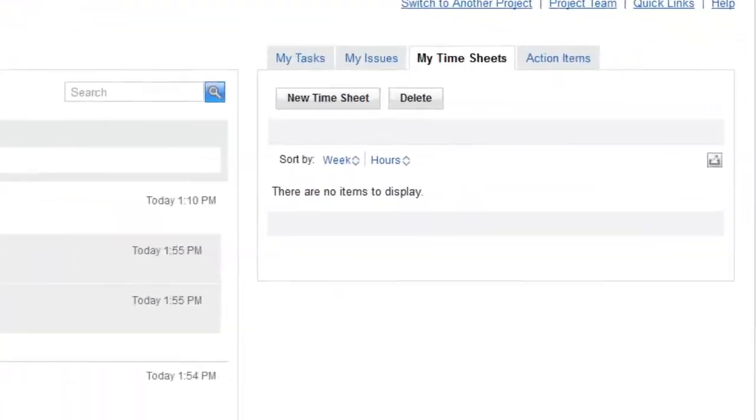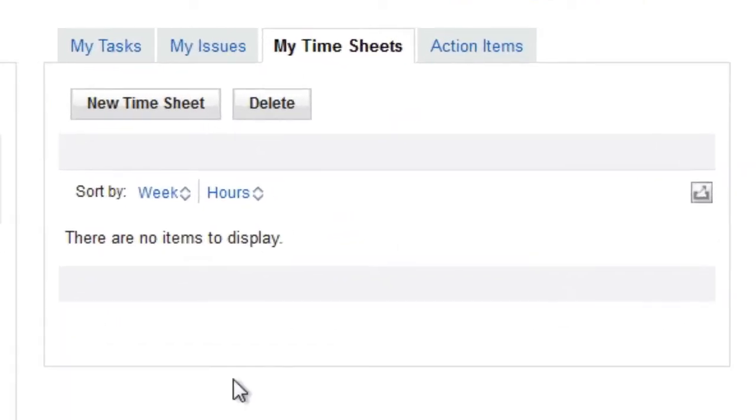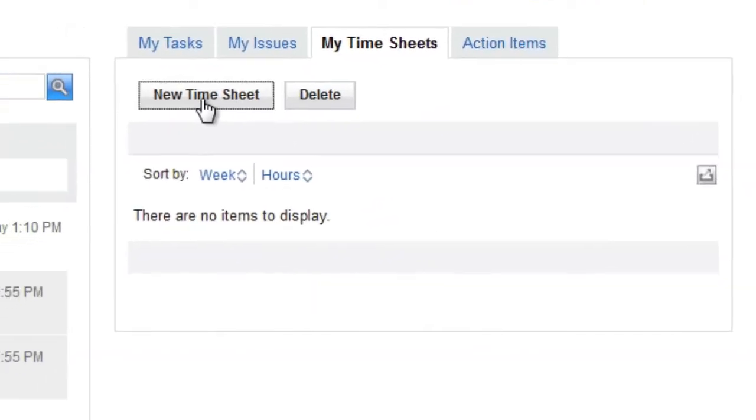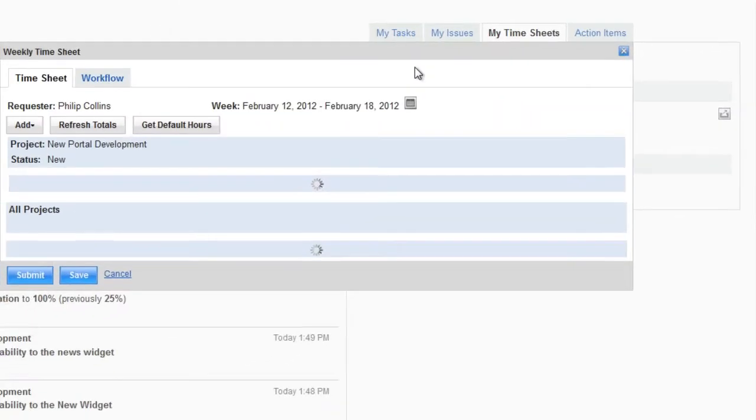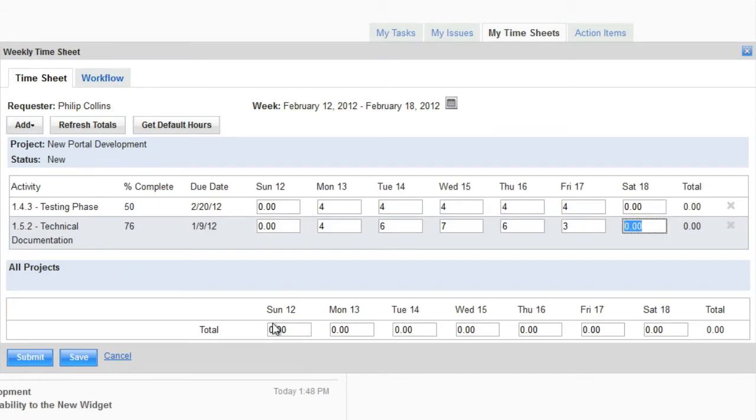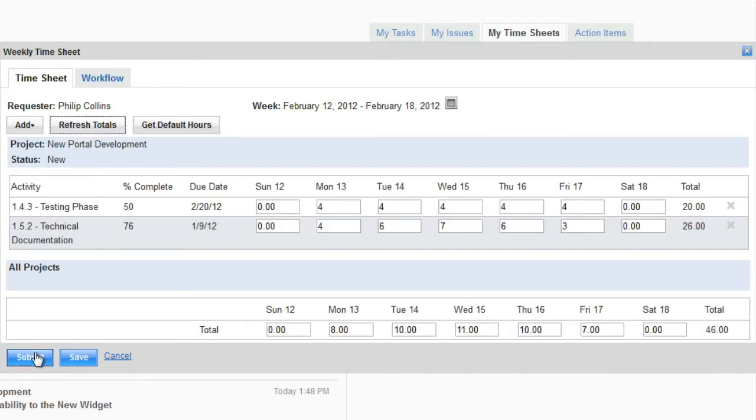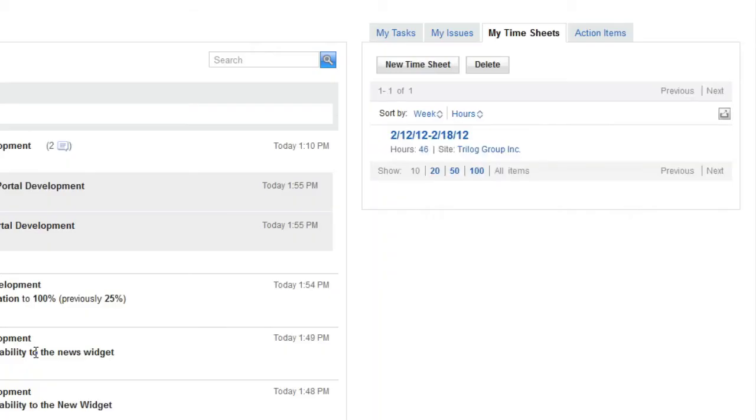Finally, Phil can complete his timesheet for the week. Once Phil completes and submits his timesheet, it's routed to each of the project managers for approval.